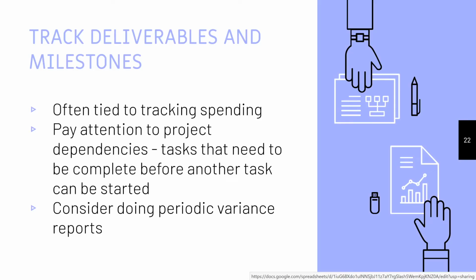Along with tracking the burn rate of your budget, it is tracking deliverables and milestones. They're often tied to spending. Of course, because if you have a service provider and they're doing a defined unit of work, and they give you an invoice for that, then it makes sense that they're tied together.